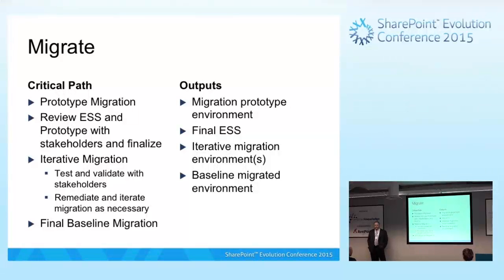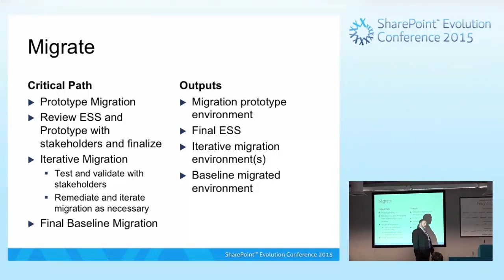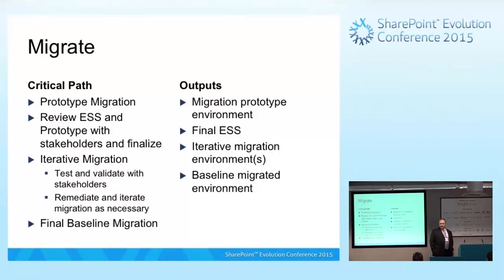So, the prototype allows you to begin to mitigate and remove the risk that surprise of your user base and audiences poses. And you get it out to as many people as you can. So, we had point A, point B, we have a mapping database, we run a migration. We stop at a certain point, we solicit feedback, we get it back, and we tweak the ESS and the map. We tweak it based on that feedback, and then we start iterative migrations. The prototype is a milestone, which is, congratulations, we have a new SharePoint site, start looking at it.